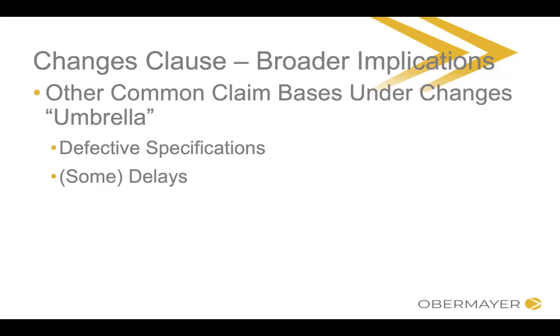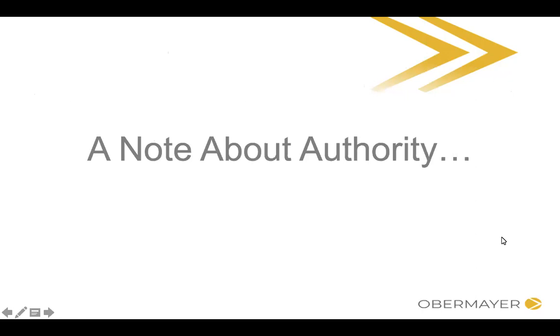So even if you're not going to have additional money, additional damages as a result of a change, if you're just going to have additional delay, all of the stuff that we just talked about applies. You need to give notice and you need to preserve your rights to be able to get an equitable adjustment of those days, even if there's no dollars tied up with those days. It's rare that there's no dollars tied up with the change, and rare that there would be no dollars tied up with the days themselves. But sometimes you're just going to want the days and not the dollars. And all of what we talked about applies. Delay claims that arise out of changes are technically under the changes clause, and therefore everything we talked about, including all the notice requirements, applies.